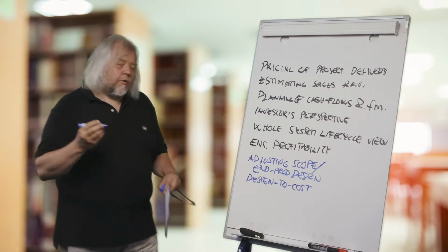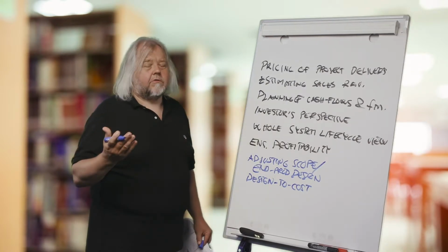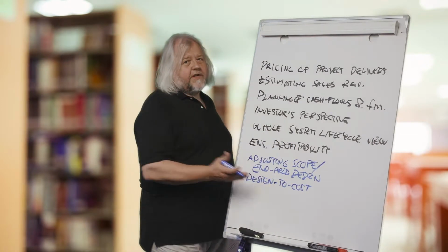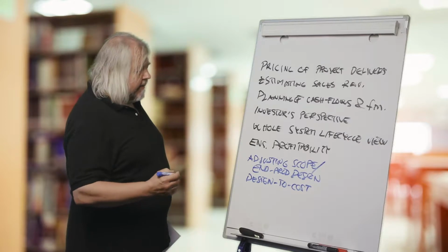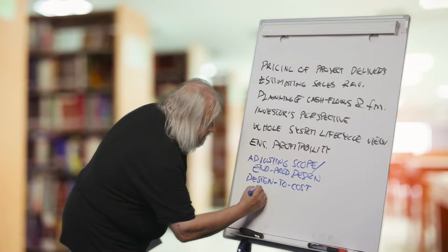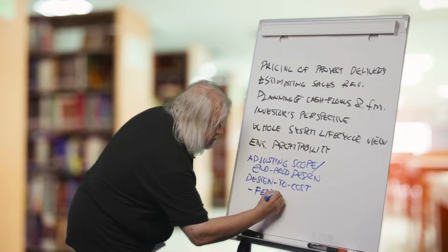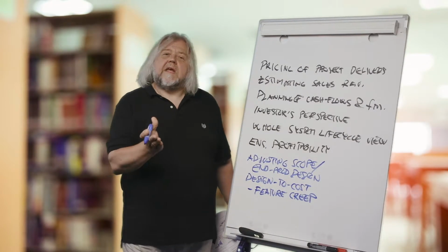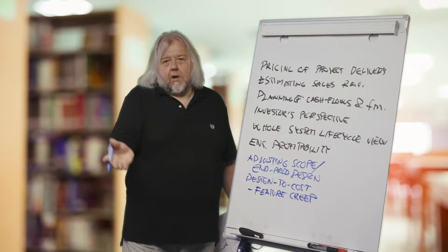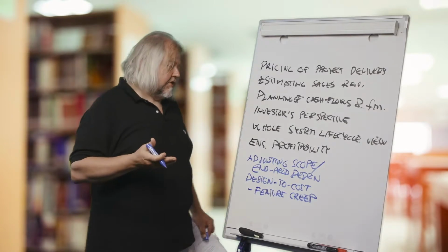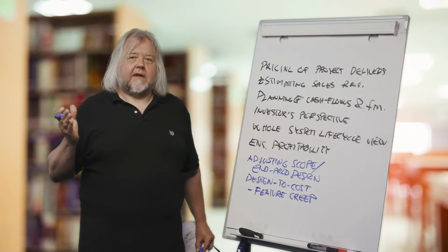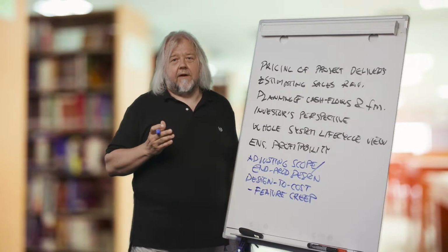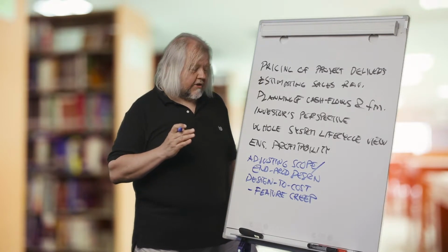Because it is well known that in projects, if we don't set any limits, for example, the profitability aspirations for the designers and project personnel, there is this phenomenon of feature creep, which means that project people are adding additional features to the project which are not necessarily needed, and they can even be very dysfunctional and costly, and even cause problems afterwards.